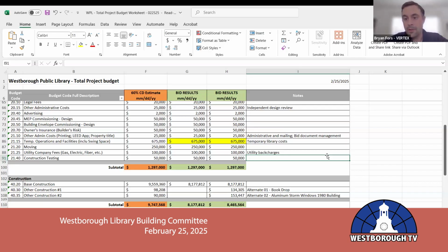It is my recommendation that we proceed with this work to get this underway. That can be funded out of our previous appropriations contingency that we still have. That will allow us to identify any work that needs to be done. And then once that work is identified, I'm under the assumption that the project would need to pay for this work. We do have some contacts from Johnson Controls, who owns the maintenance contract for fire alarm throughout the municipal buildings. I'll be reaching out to them.